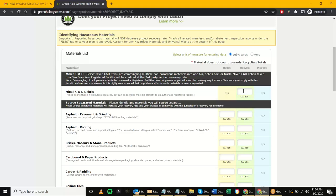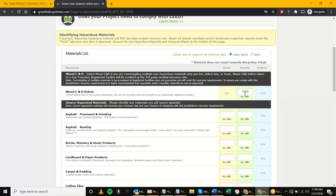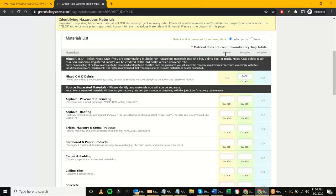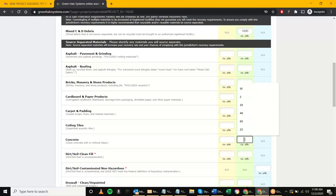So we can specify 1,000 cubic yards — really it's 1,040, but we'll round it down. Notice how materials are broken out by reuse, recycle, and dispose. Construction debris has to be recycled; concrete should not be disposed but could be claimed as reuse or backfill in the salvage/recycling column. In this case, I'll specify maybe 200 cubic yards of concrete. Some contractors get very granular with materials; others just say they have a dedicated C&D bin and move on.